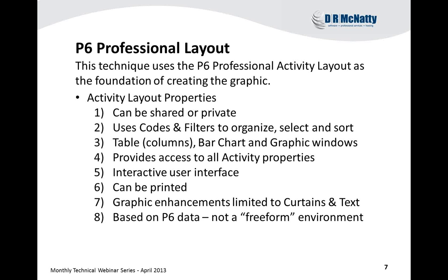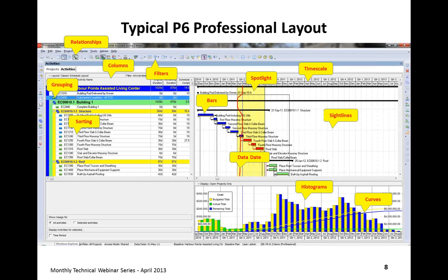It's not free form. If I have to dig in for more detail to back up a graphic, it's all readily available to me within the P6 database. So here's a typical P6 Pro layout. I can turn on and off relationships, control my sorting, my grouping, my summarization, my subtotals. When activities are selected, I've got spotlight, because the spotlight's on, and it's also highlighting certain activities. You can do my sight lines, my data date, progress date, histograms, curves.